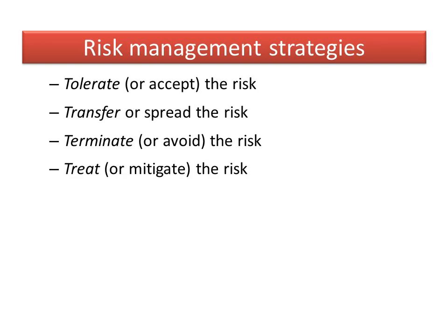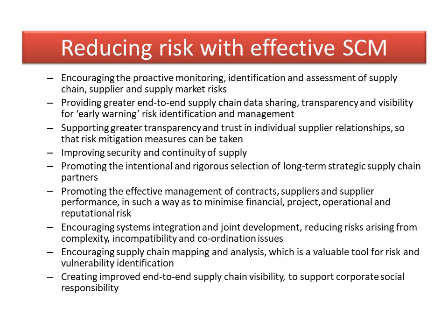We may use the 4 T's as an explanation. So once we've assessed the risk, we can tolerate it, transfer it, terminate it, or treat it. The 4 T's, a very easy way of remembering possible strategy.